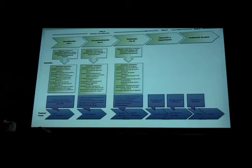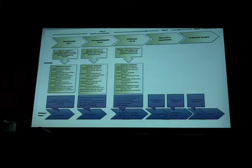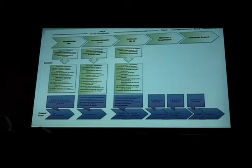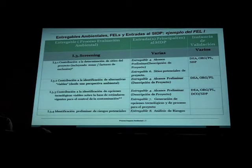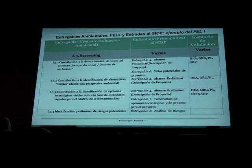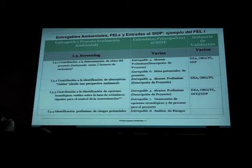Once we did the gap analysis, we mapped very clearly what inputs the EIA has to provide into the front-end loading or project development process to make it a robust system. We went through each of the different stages of the project development process, incorporating and understanding what input is required from the environmental assessment. For each specific point of the EIA, we identified the different gate entry points into the project development system, and also what resources for validation and which people or organizations need to be involved to validate each of these points.